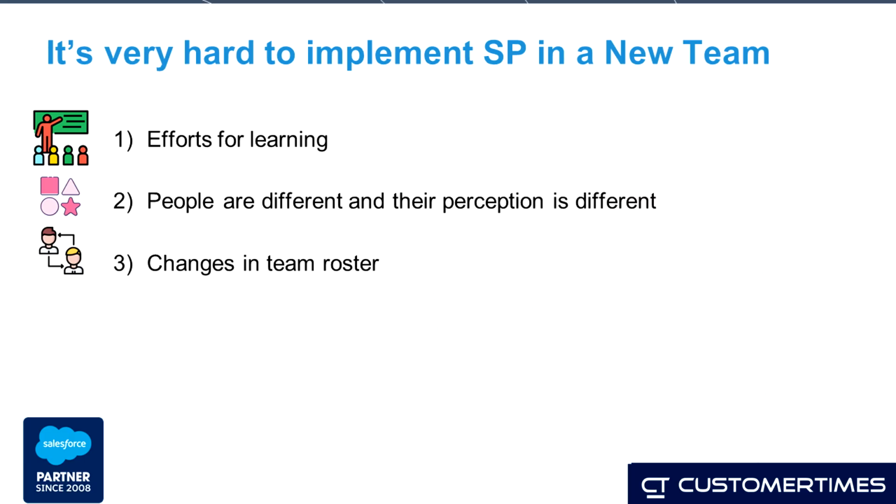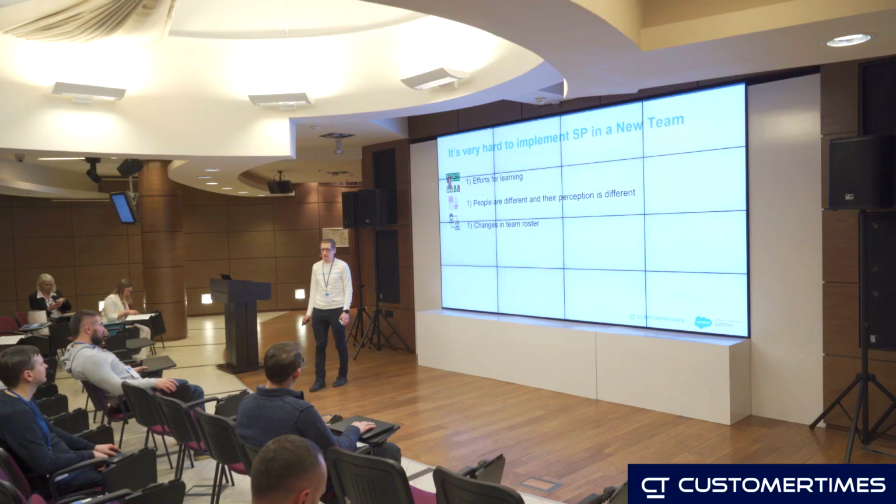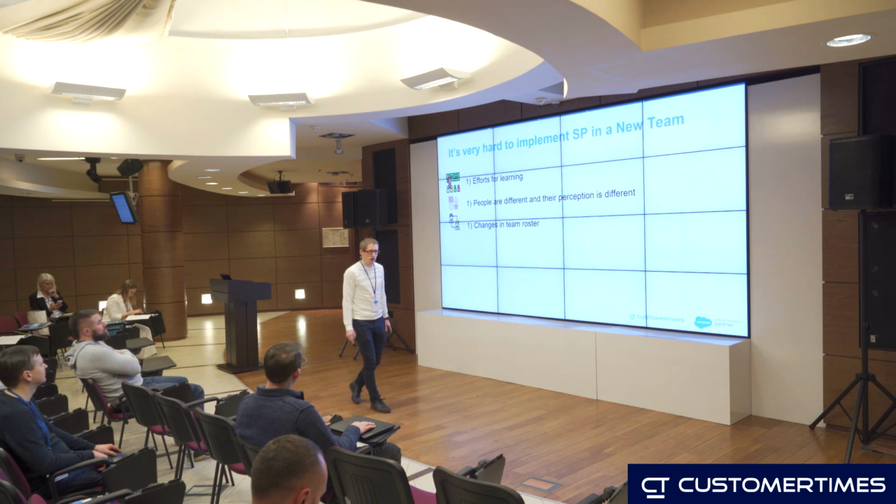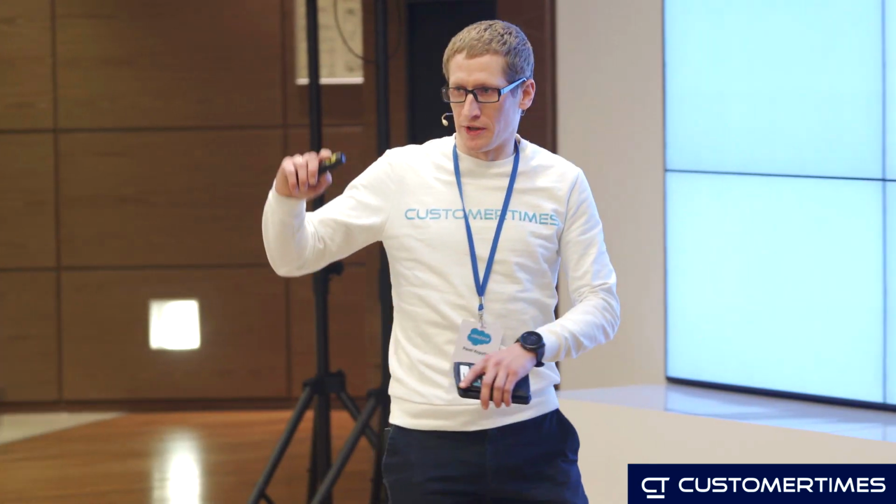The second challenge: people are different, and their perception is different too. I can share my personal example with the MuleSoft team. When we discussed one user story, one developer estimated it as 10 story points, the other as 4 story points. I tried to clarify why it was so different, because I didn't know. And during the conversation, I understood they meant the same effort for this user story, only 2 days. They were only confused about the story point scaling.